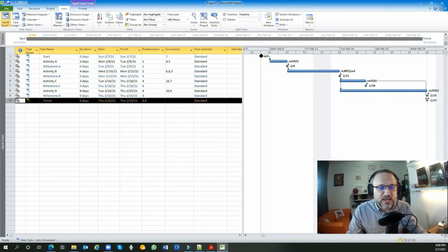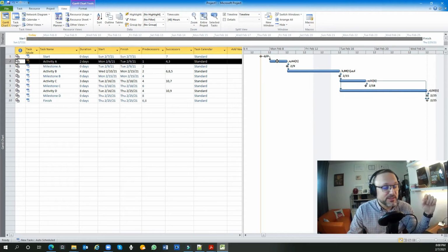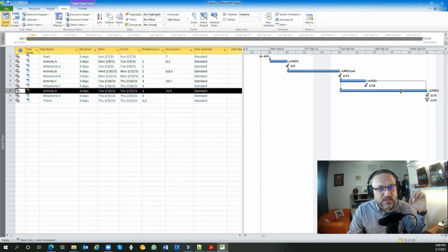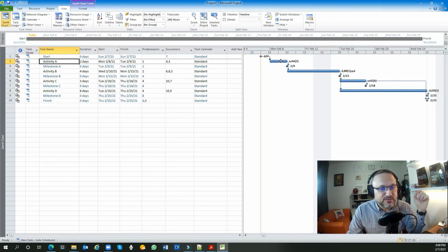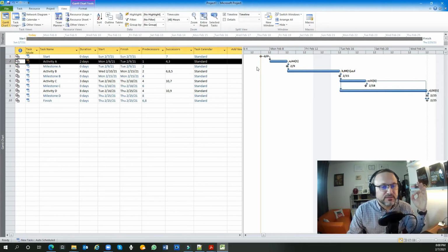You can see that, okay, I'll start my project. Once I start my project, I can start with this activity. So I'm preparing myself for this activity. Once you are looking for the next activity, the look ahead means today you need to focus to start this activity and the other activity, and give those activities a priority prior to the other activities. Means I have to start preparing the material of activity A to be ready on site.